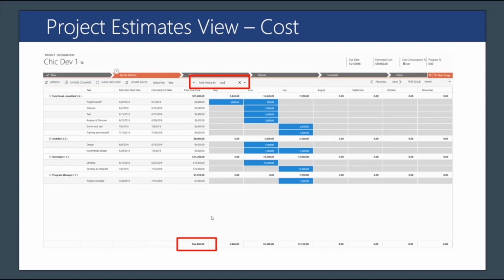And this view right here is also where we could potentially create an integration with Microsoft Project, where with a Microsoft Project file, we can upload our tasks into PSA to help populate a WBS, or we can even export our WBS out to Microsoft Project to create a parent-child relationship between the two, where we can make our edits in one and then have those populate down to the child in whatever direction we make that relationship.